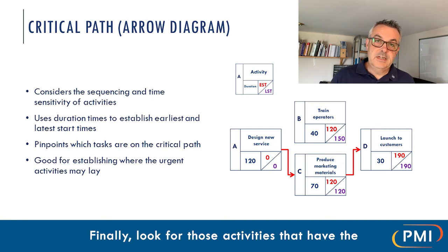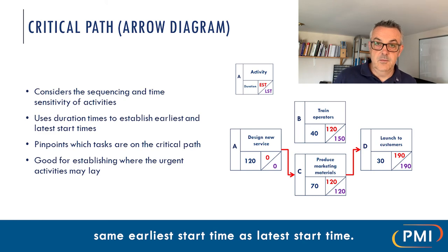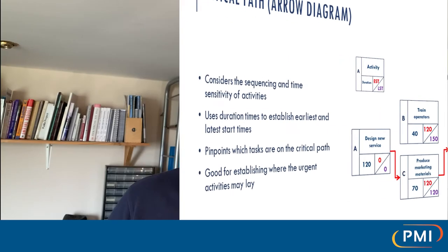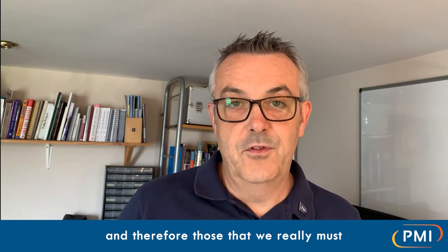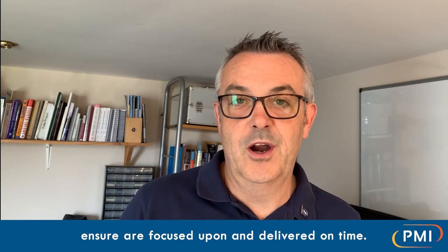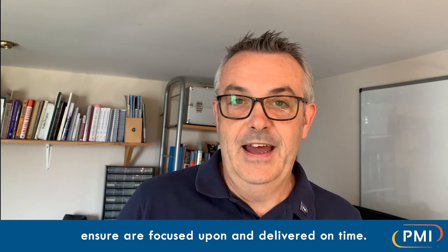Finally, look for those activities that have the same earliest start time as latest start time. These represent the critical path activities and therefore those that we really must ensure are focused upon and delivered on time.